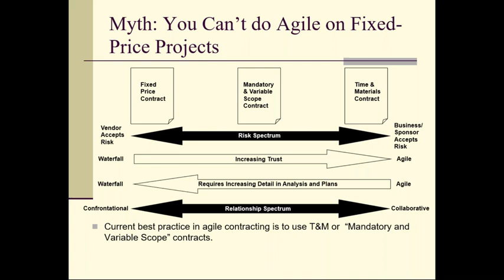With waterfall, you want tons of information up front so you can build the perfect plan, and then you try and stick to the plan. But if I'm paying you time and materials, you've built into that plan contingencies in case risks occur, right? Now, if those risks don't occur and we can come in ahead of schedule or under budget, I'm going to pay you less as a vendor. So it's almost like you're penalized for doing a good job.